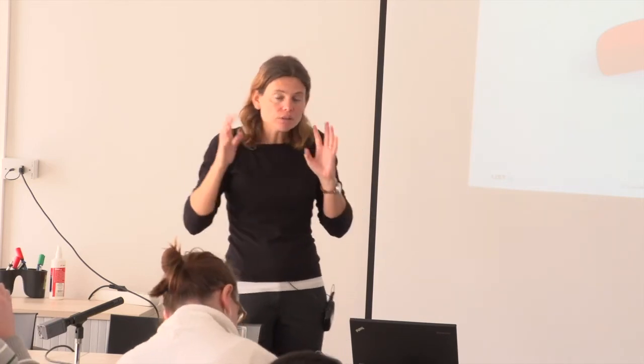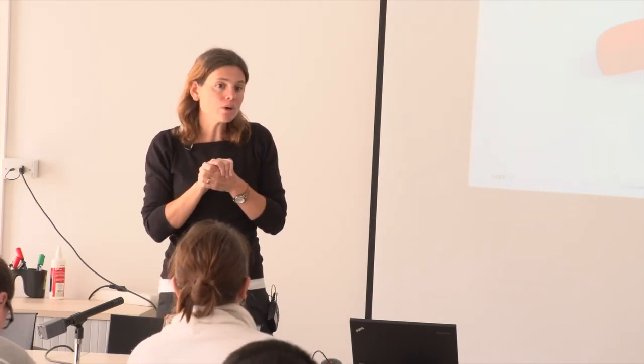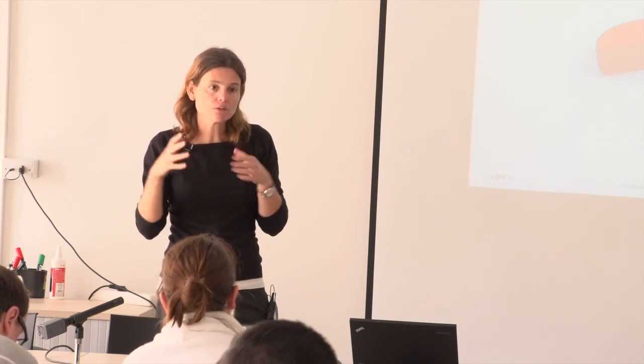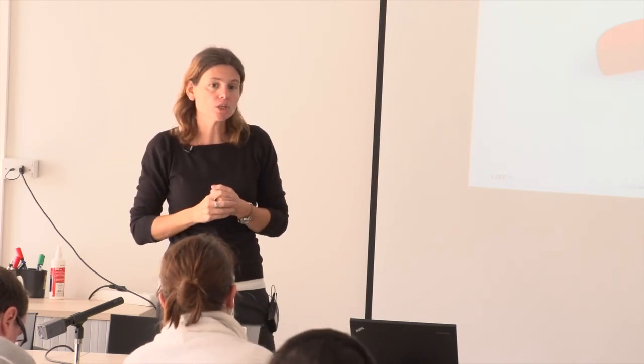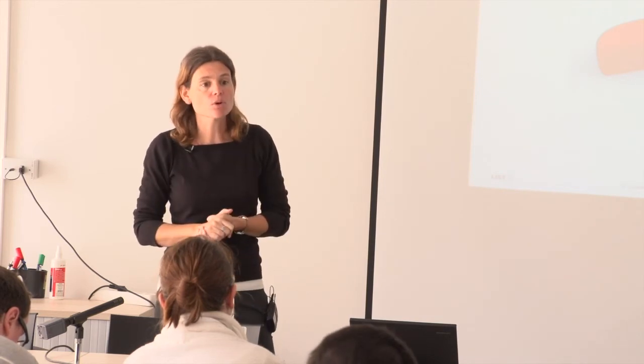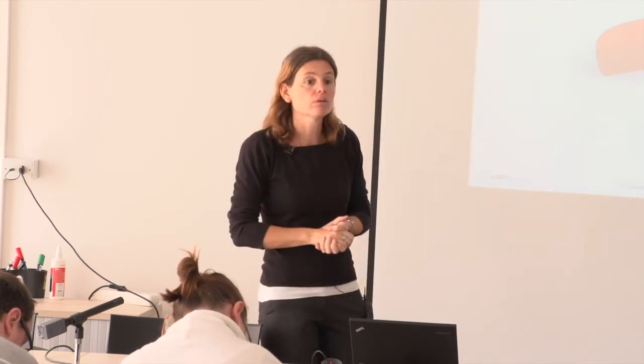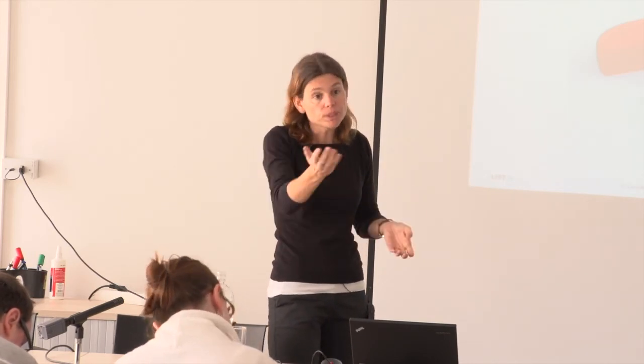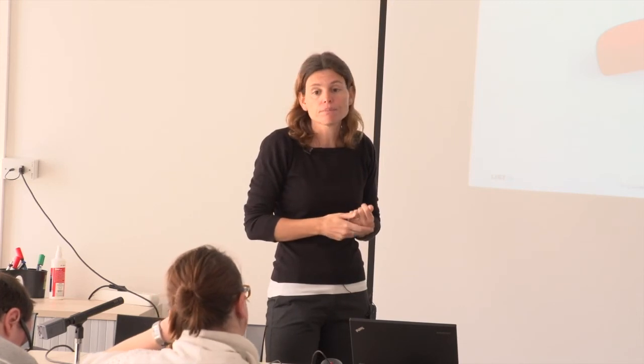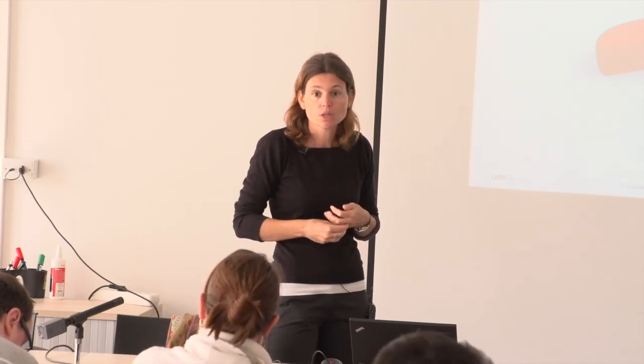Just having a one hour meeting with the team and trying to understand what went right and what you would do exactly the same the next project, or what you would do absolutely differently the next project. It's really one good way to start. If you cannot do it with the team, do it with yourself. If you can do it better with another broader audience, then it's shared with more people, and then they will think about it in their next projects.